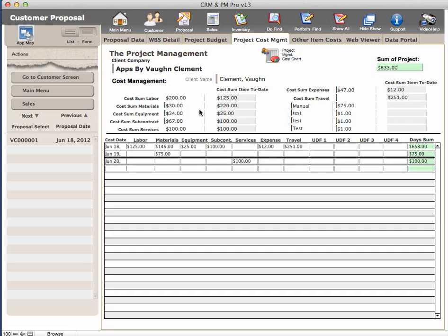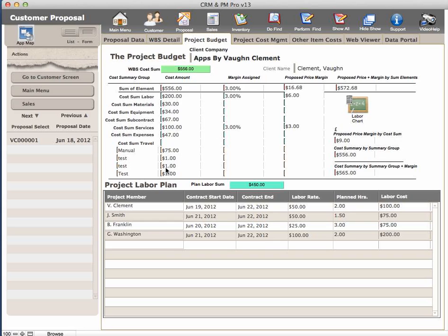There is also a cost management section where you can see the individual cost elements of the proposal, with a budget element where you can actually budget it by department, or you can do a straightforward load of the allowance that you're going to take as far as the margin is concerned. It will calculate all these in here for you. It's kind of a no-brainer. It actually just works the way it should, and it summarizes the total for the entire proposal at the cost level and then at the loaded margin level at the other side, and the total of the priced proposal as you go down through. And this is broken down. Obviously, I just put a few figures in there. If you had a large proposal, it would manage up to a $1 billion contract, no problem at all.